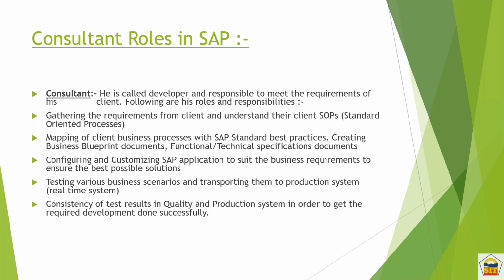If there is any gap, let's say we are able to map 80% of business processes, which are given by SAP and are matching the client requirement, these are the standard solution I'm talking about. Now for 20% we have a gap. So for that we have the fit and gap analysis. Under that fit and gap analysis, we will mention that this is the 20% gap we have.